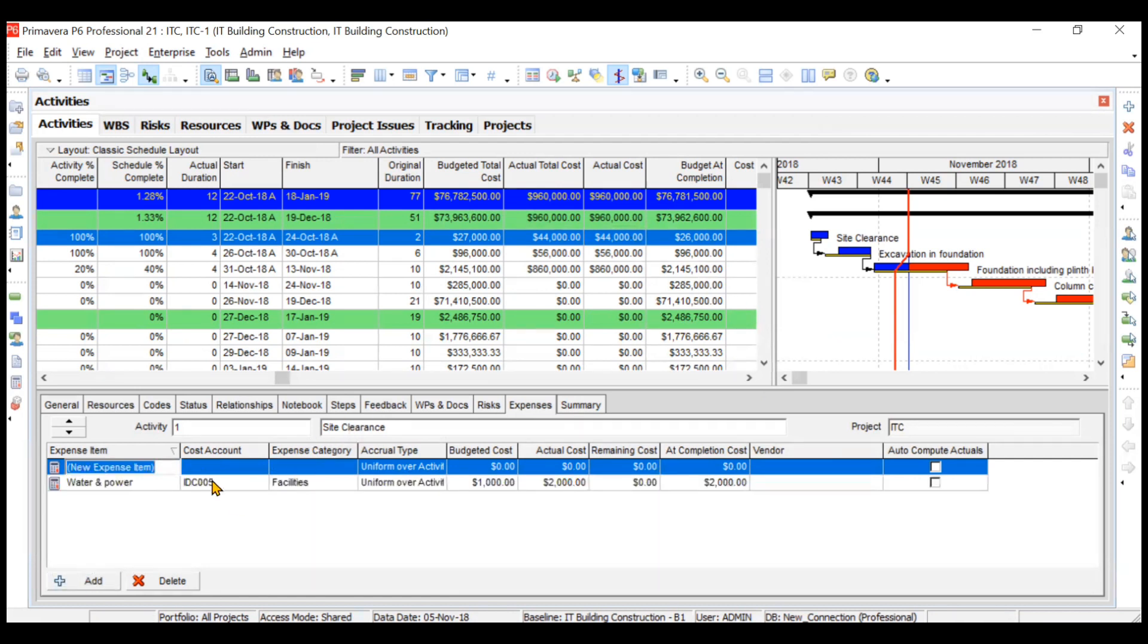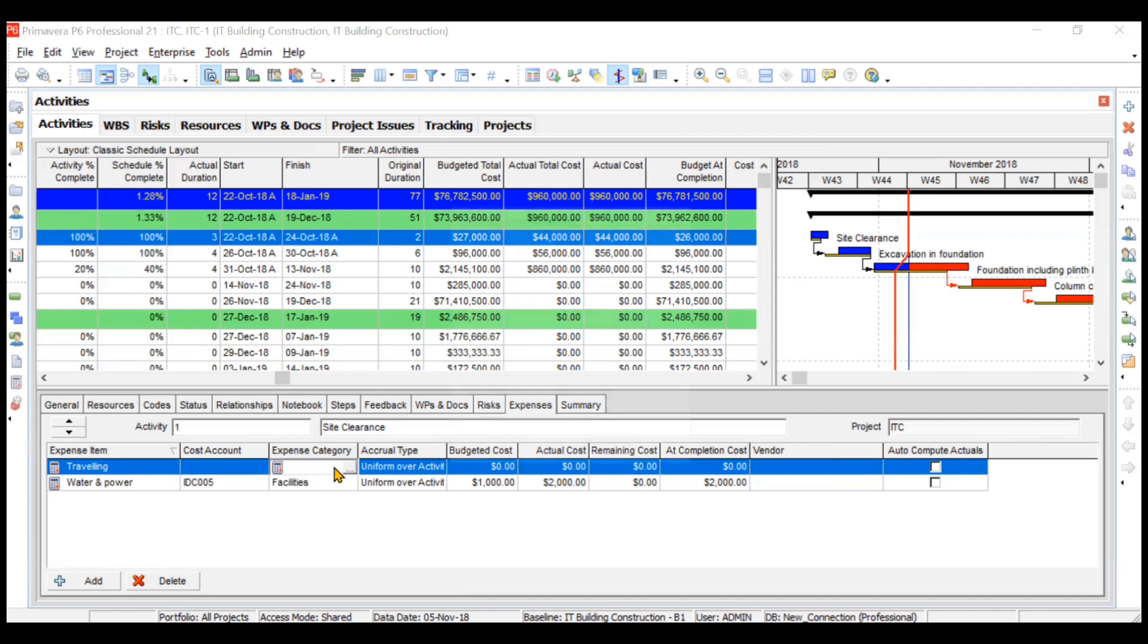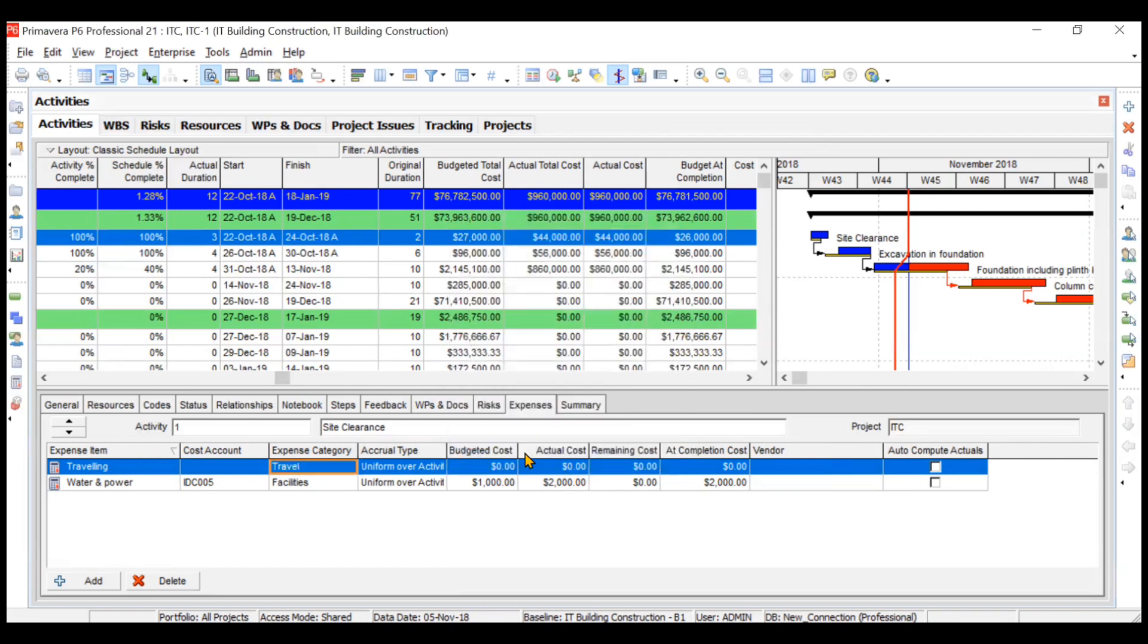Suppose you want to add traveling expense. You can add the traveling expense, choose the cost account—maybe create one more cost account—choose the expense category which will be travel, and update your budget cost, actual cost, and it will get reflected in the activity.